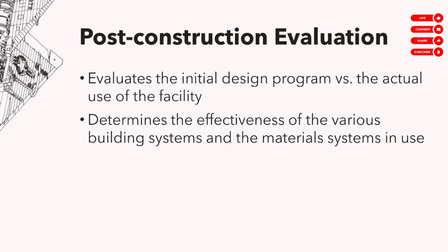Like for example, there's an initial design program versus the actual use; sometimes they're not the same. During planning and design, they envision that this atrium will be like this, people will go there for this, it will be a venue for this. Did it actually happen? Is it really an attractive location within the project? Or are rents really higher in that part of the mall because the design is good? So that's an evaluation: evaluating the initial design program and whether it was truly achieved in real life.